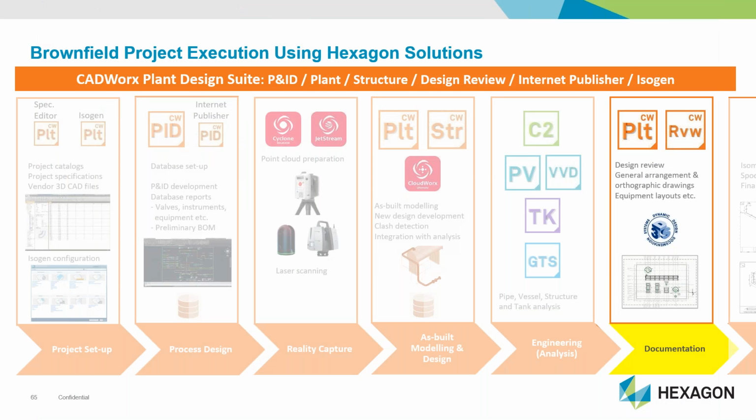Now, once the design is considered code compliant and no further changes are envisaged, final documentation can be produced for fabrication and construction. At this point, the virtual design is going to be turned into physical reality. So you really want to be sure that the deliverables you're going to produce are complete, accurate, and easily understood. Because if delays occur due to dimensional inaccuracies or omissions, costs can significantly increase if rework or scrappage occurs whilst errors are being rectified.